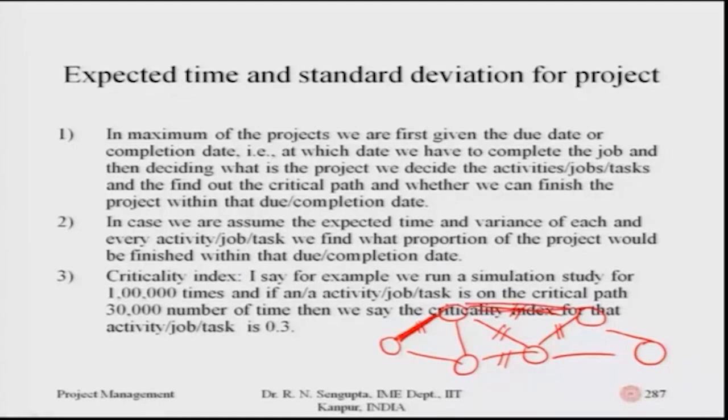Added up, you will see they are logical activities, but they do not complete the project. That means they are not as per the concept of the critical set of activities which makes the critical path, because you have to start at 1 and finish at 6. If this 4 to 6 or 5 to 6 is not there, obviously it does not make sense to consider them as important for the critical index concept.